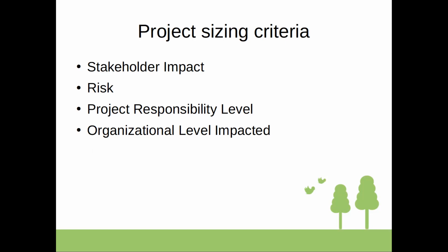But if it's a project that the project manager has to spend full time on, then it's a completely different situation. So this is also a criterion for the project: how many resources are allocated. Maybe it's a full-time resource for this project, meaning this is a big project. Again, it's a matter of decision from company culture and perspective.